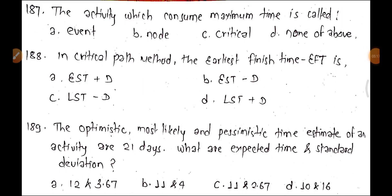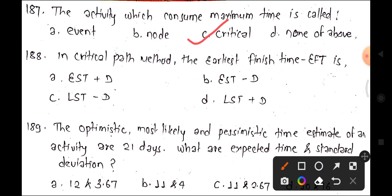Question 187: In the Critical Path Method, the earliest finish time (EFT) equals the earliest start time plus the activity duration. Activities on the critical path have no float. The correct formula is: EFT = Earliest Start Time + Activity Duration. Option A is correct.